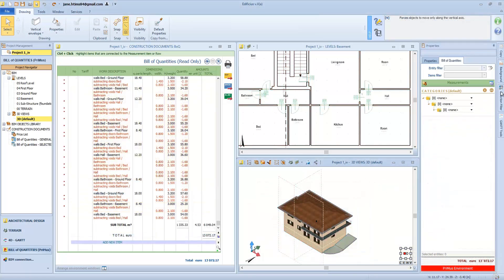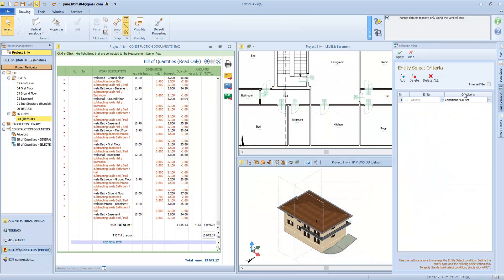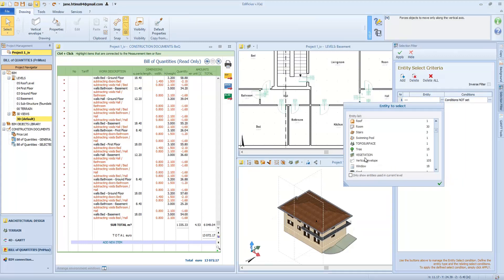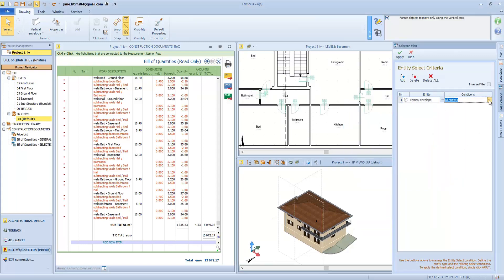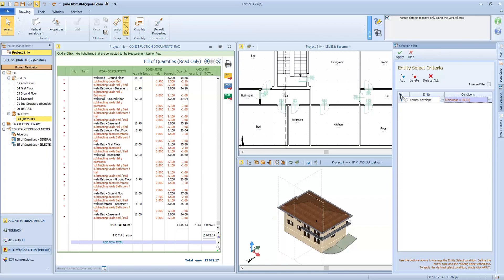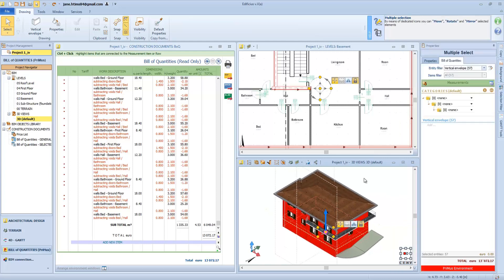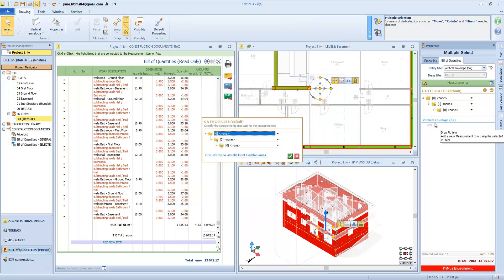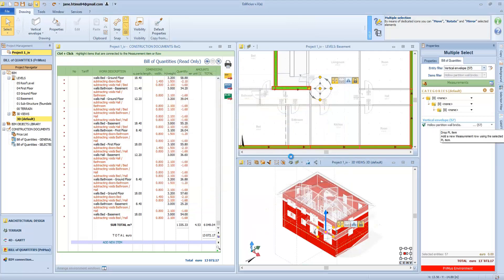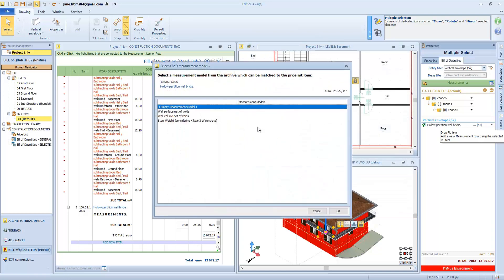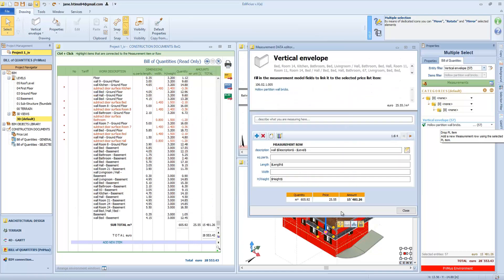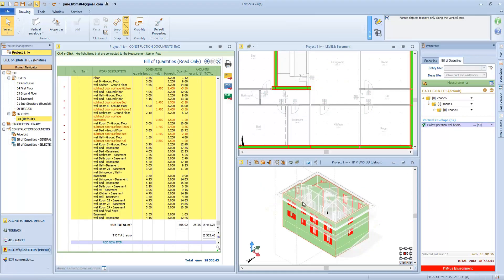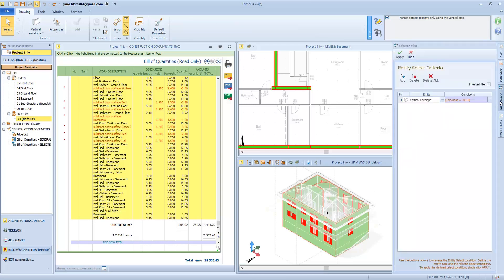Again, for a set of objects, we can proceed as follows. Select the building envelopes, and with the selection filter I can set up a search criterion based on thickness or other geometrical characteristics. So I will select all the walls with a 30 cm thickness. This will then be united by a single item, for example this, using a pre-defined formula for surfaces net of any empty space. With just a few steps, we have acquired all the relevant data to acquire measurement and assign cost data to our external walls. So you can see how this particular entity selection filter allows us to group up certain objects and assign them with cost-related info, ready for preparing a detailed project cost estimate.